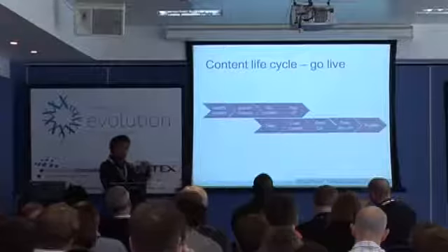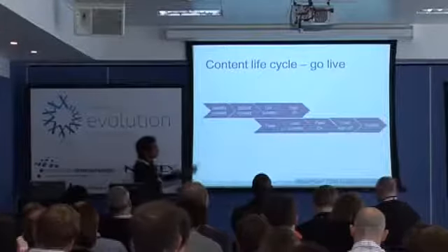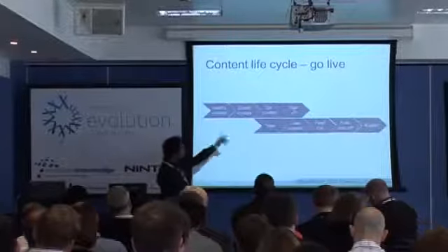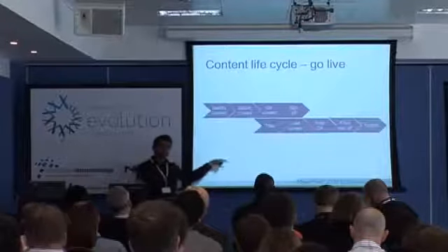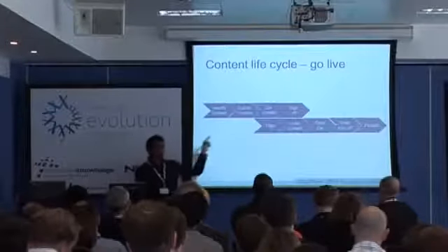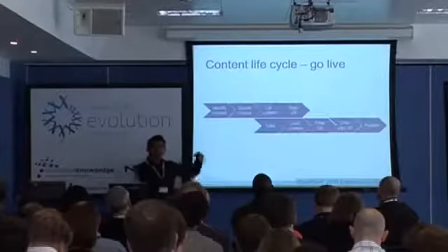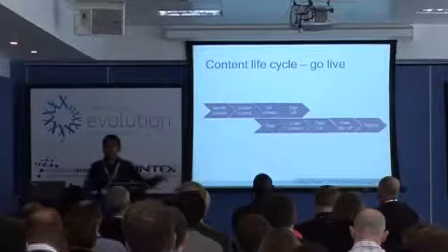Once the website build was underway, the developers were doing their own thing, building this thing. At the same time, on the training side of things, we got the content authors to start using the system to input the content. So by the time we were ready to publish, all of the content was already in there during the training cycle. So we didn't lose much time doing that.